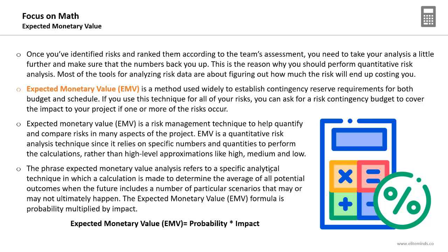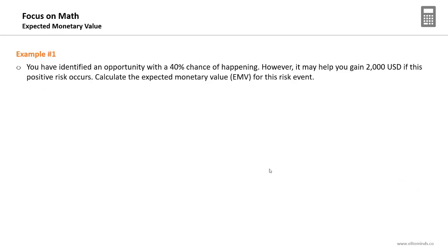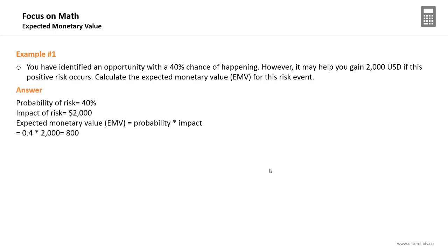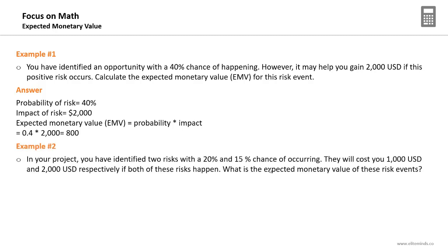The formula is simply: probability (in percentage) multiplied by impact (usually a budget or schedule figure). For example, you have identified an opportunity with a 40% chance of happening that may help you gain $2,000 USD. Calculating the EMV: 40% × $2,000 = $800 USD. Note that you must give a positive sign for opportunities and a negative sign for threats in the EMV formula.